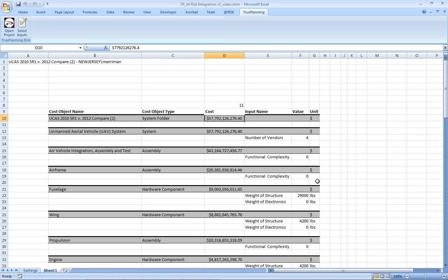If people really start using this, we need to become better advisors on how to use at-risk. Maybe we'll have to learn that. But like I say, there are ways. The example people give is the prime rate versus mortgages. As the prime rate goes up, fewer people borrow money. As the prime rate goes down, more people borrow money. That kind of relationship, an inverse relationship or the same relationship, could be set. So again, you do have to be careful with the values you choose.